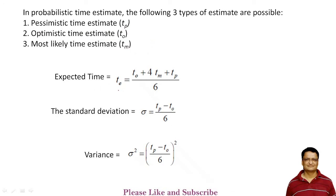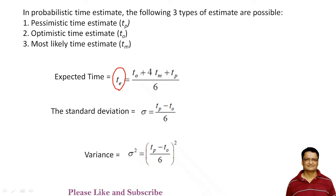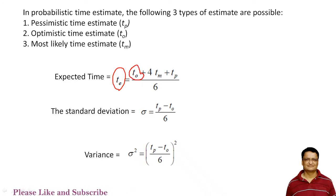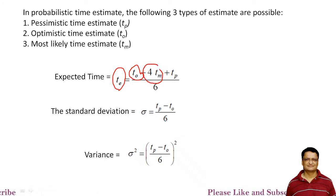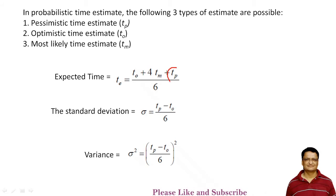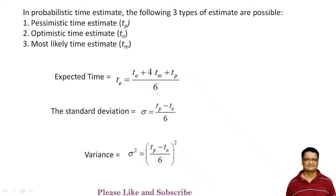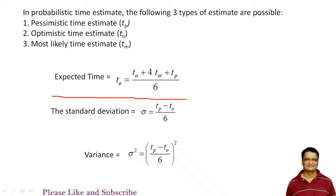We calculate the expected time with this formula: T_e = (T_o + 4×T_m + T_p) / 6, where T_o is optimistic time, T_m is most likely time, and T_p is pessimistic time. With this formula, we can calculate the expected time for a given activity.